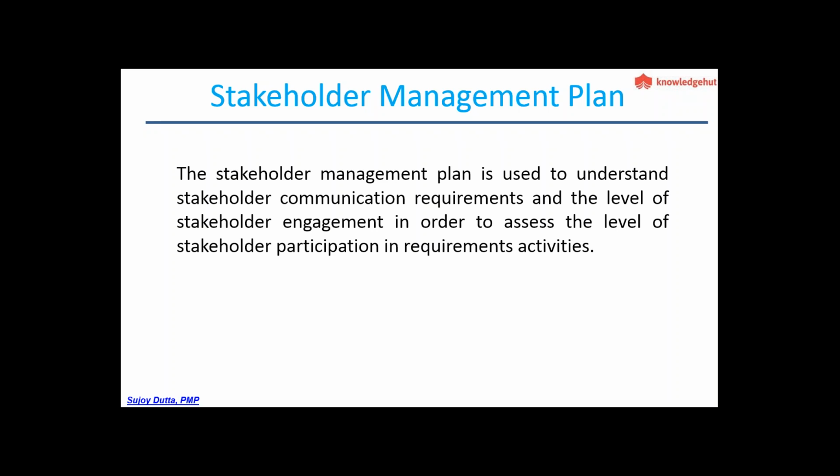So you should be able to use the user acceptance test criteria to fulfill the expectations of the client. You can create it milestone-wise also, that is, the user acceptance test criteria for milestone 1, milestone 2, milestone 3, and then for the overall product or project. All that can be collected, and you can run the check against the user acceptance test criteria each time you are ready to provide a deliverable. Okay, so who is not aware of this user acceptance test criteria?